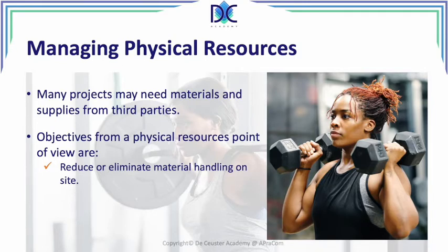Another element is to eliminate wait times for materials. We can refer to this as just in time. We need to have that information or that resource when we need it. We don't have to have them in stock for so many cases. Stock is money that is in fact blocked in the company, and with just in time, we just have the elements that we need with a small reserve, and we refill the stock every time we use those resources. Optimizing the wait times for materials will improve the project performance.